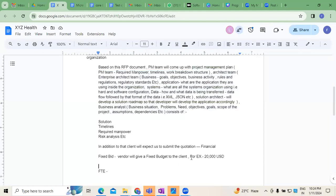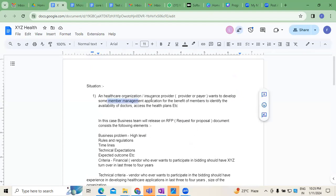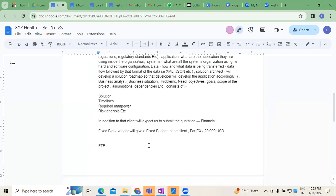If requirements were changed, terms and conditions apply. How can you guarantee that the customer won't change the requirements? There is no guarantee. In the future, maybe two or three months later, the situation might change. They may require some additional features and functionalities. If you agreed without knowing all this, with the same cost you may have to spend extra man-hours to complete that, and the project may land under break-even or in losses.